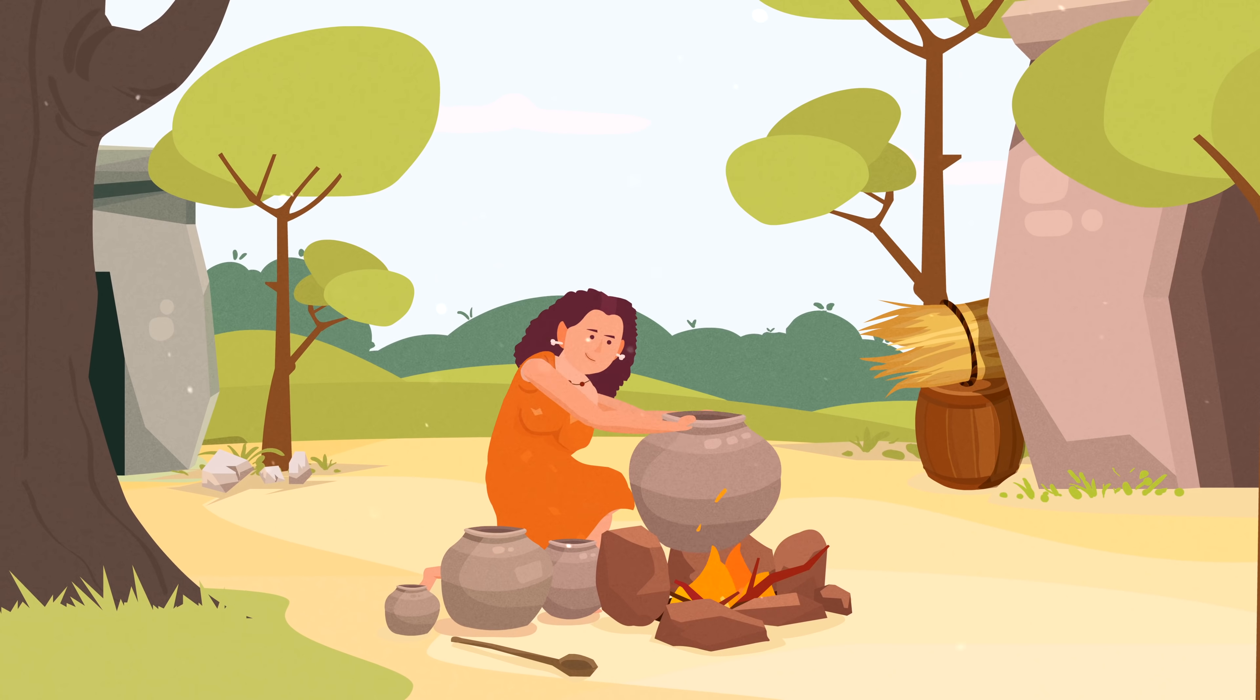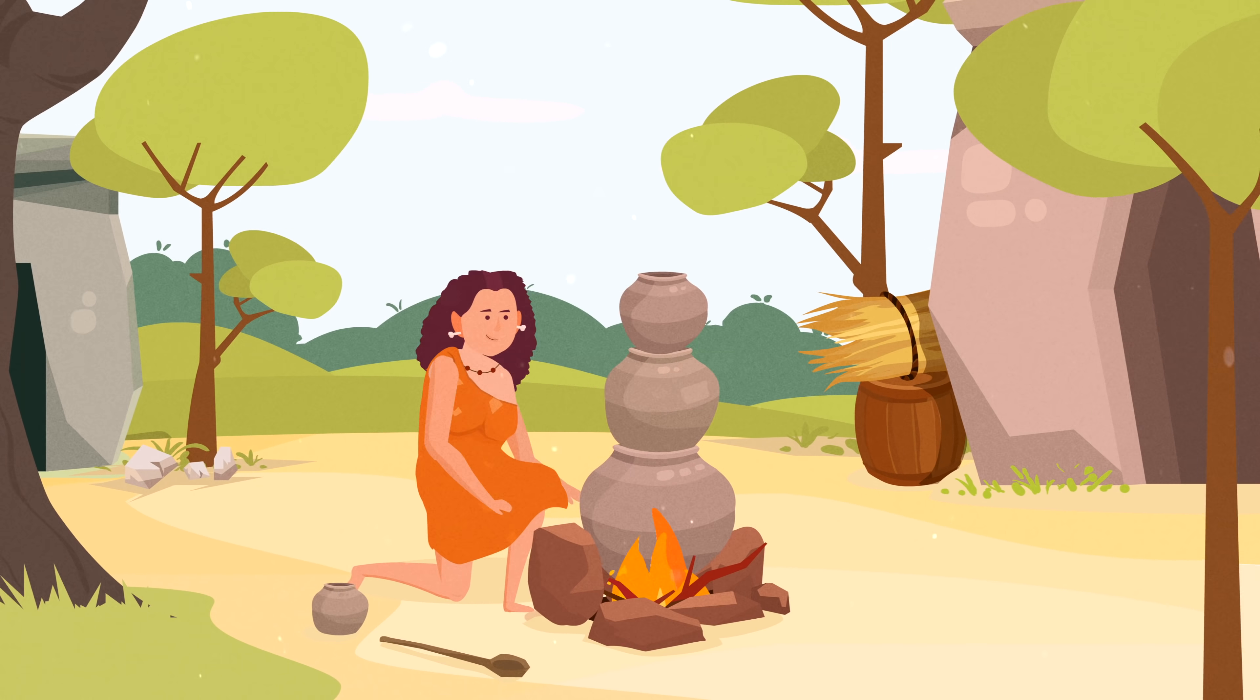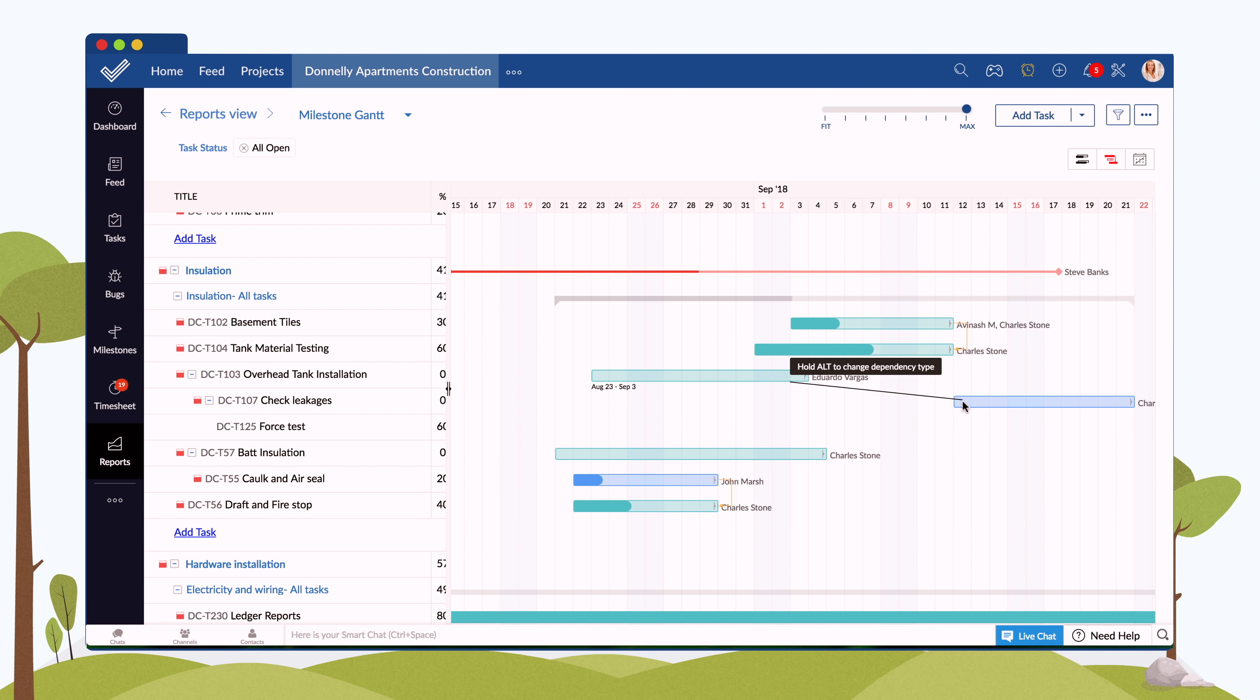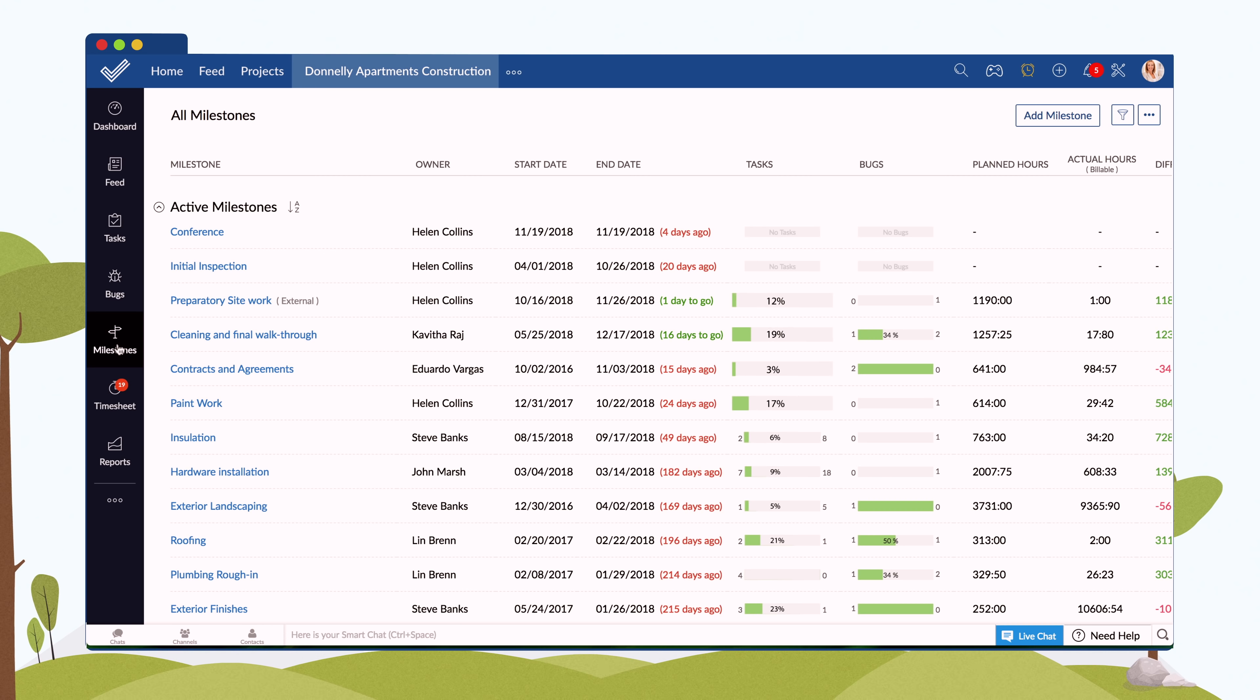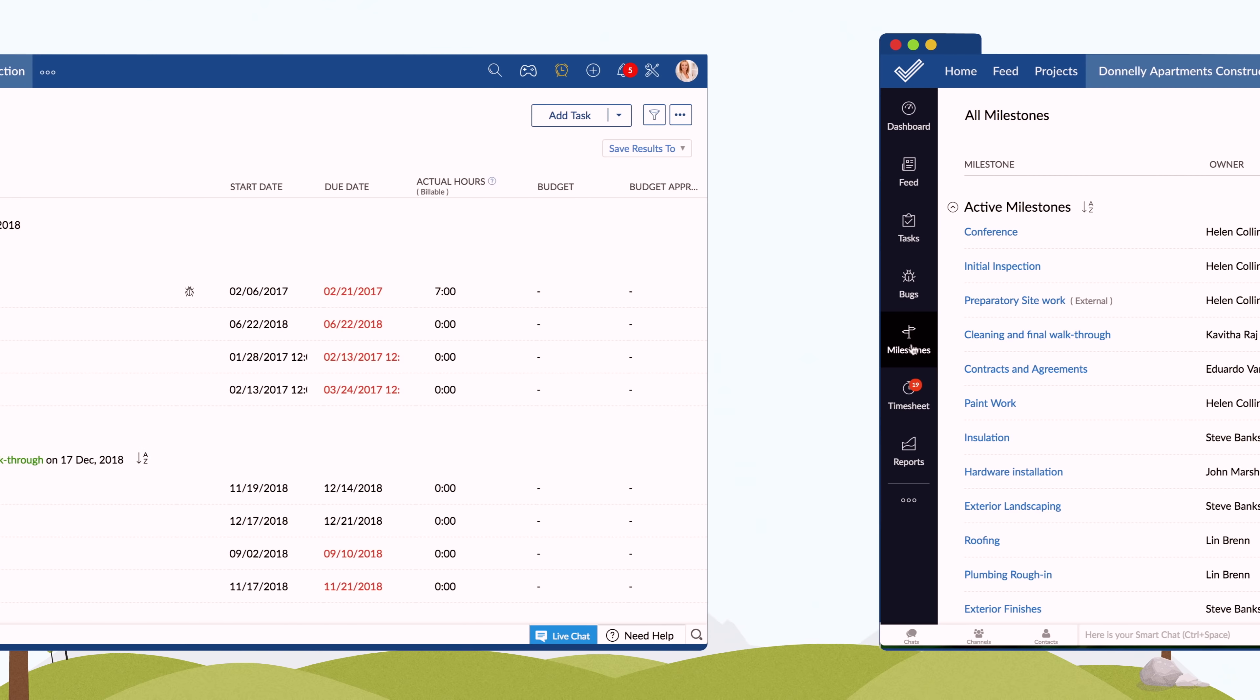If certain tasks need to be carried out in a sequence, you can simply create a dependency between them to define the order of work. Tracking your project's progress is now easier with milestones and task views.